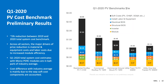This slide has a summary of our residential, commercial, and utility PV costs for a standard project size in all three sectors. In 2020, we are seeing a 5% reduction in our preliminary estimates compared to our 2019 numbers. The major cost driver across all sectors is increased efficiency due to Mono PERC modules. As of now, all our estimates are in ballpark with the industry average. One of the main differential cost components is the way soft costs are accounted in different buckets, so it is always important to consider how soft costs are modeled when comparing two estimates.